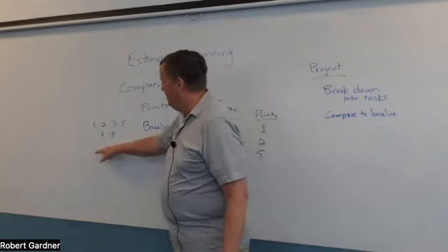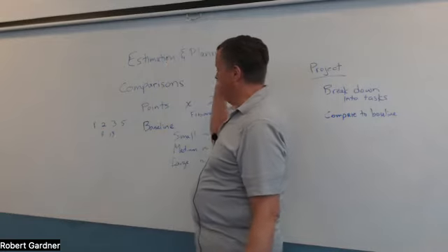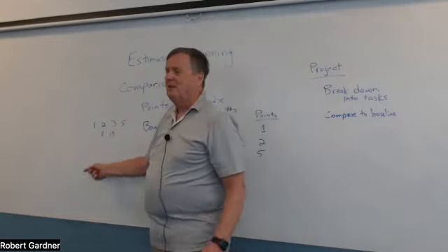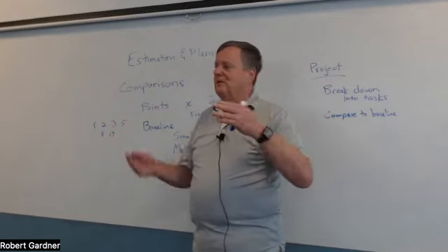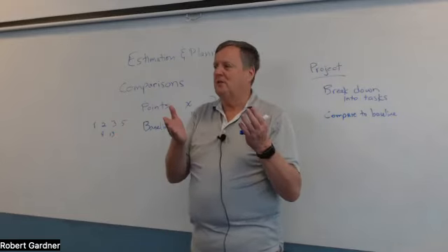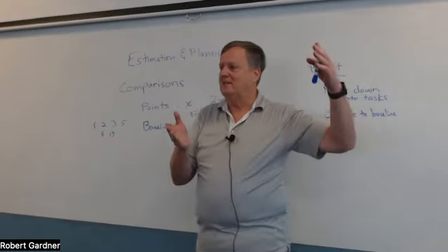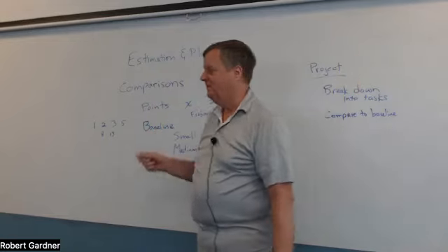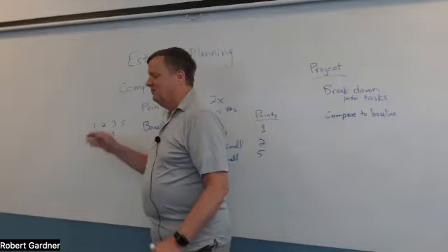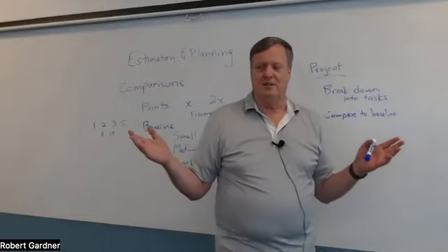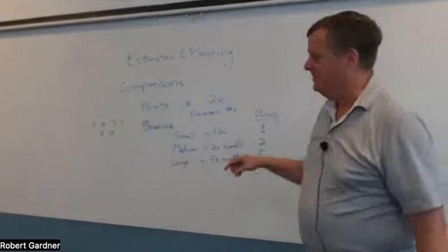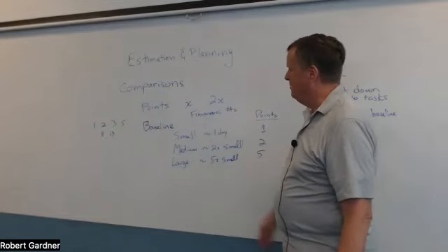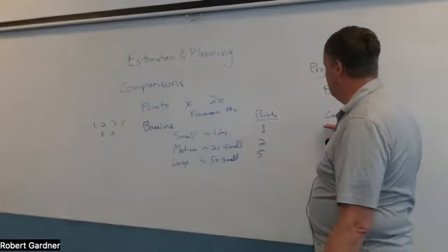If I'm looking at, say, 60, I don't remember if that's a Fibonacci number, but it's either going to be 55 or 89. You have to pick one of those, and they're really far apart, and that is advantageous because it reflects the fact that it's hard to estimate at that scale. So anyway, I pick these Fibonacci numbers.